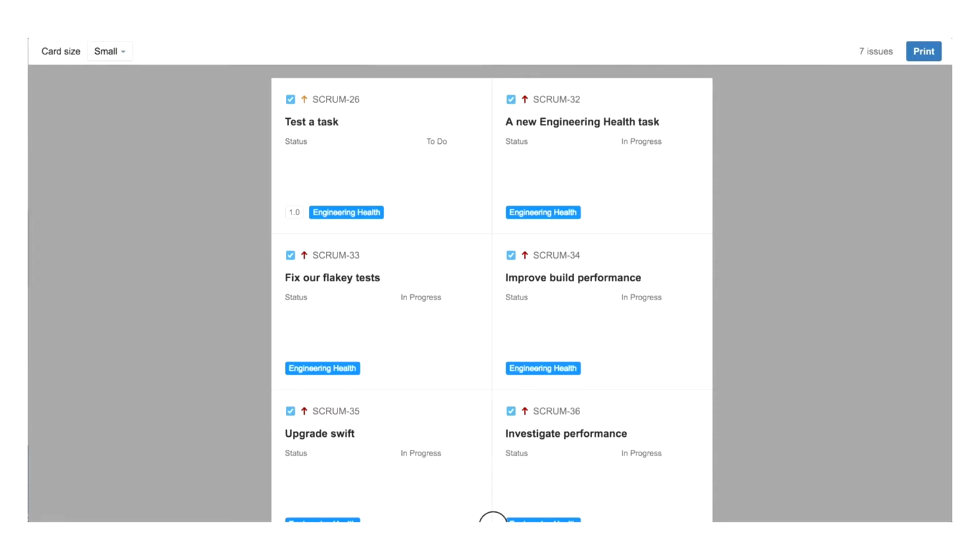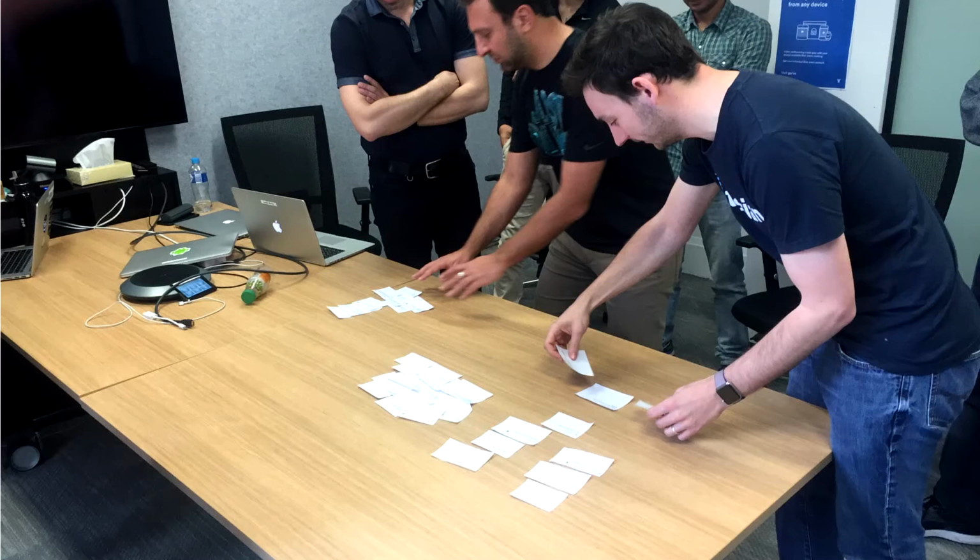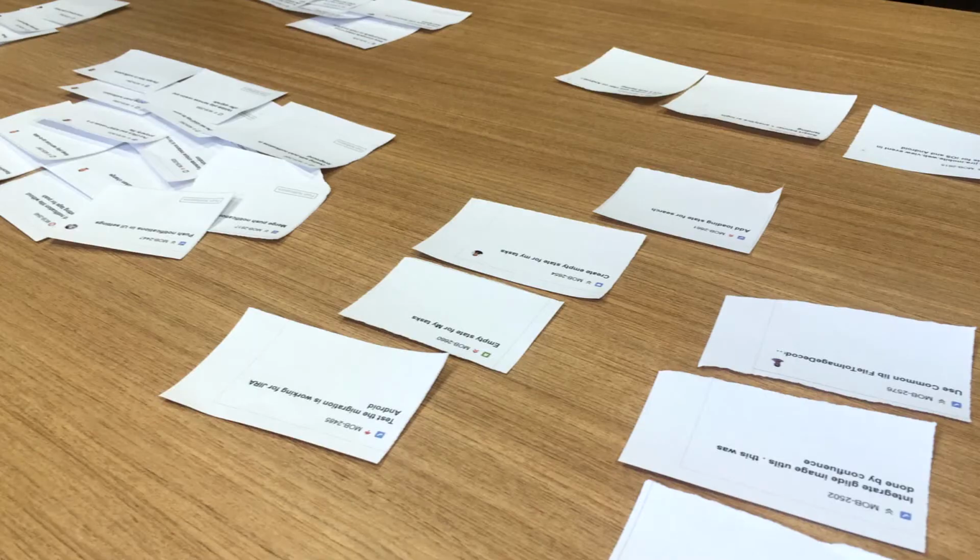The team, it's quite a different experience. They're not using JIRA Software or a monitor. They're just using these cards to lay them out on the table, and the goal here is to rank them by estimate and complexity. So they read them out as a group, they make sure they all understand them, place them out on the table, then they start just by putting one card out on the table. That's kind of your baseline. Everyone understands that, and then they start ranking the cards from simple to most complex along that table. So you can see here the simple end and the complex end.